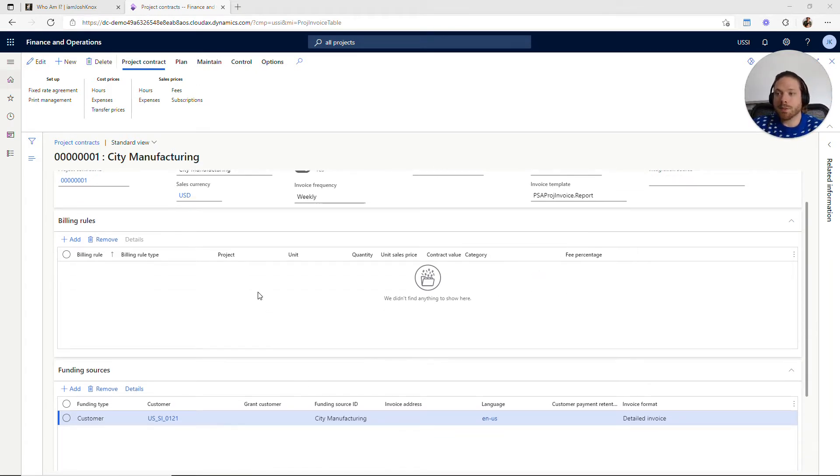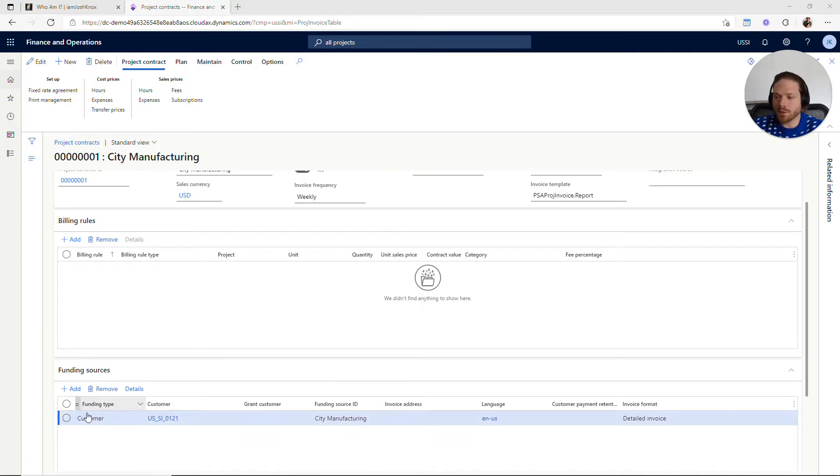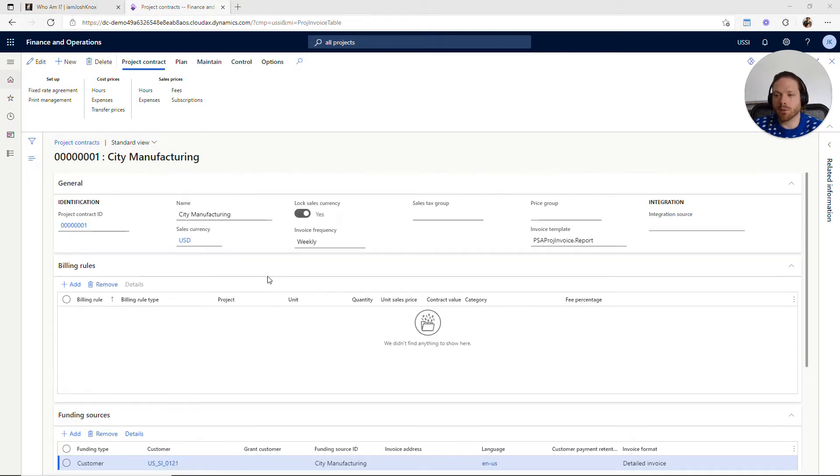The concept of a project contract is to associate one or more customers, the funding sources, and associate the customers with the project or projects that are related to a contract.